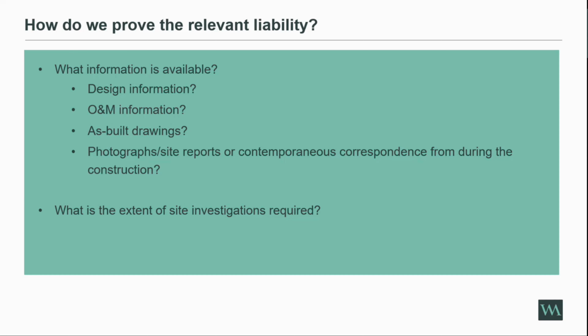It's fine for us from a legal perspective if, as you start to carry out investigations and take apart the external walls, a clear pattern starts to emerge, then that might be sufficient. We don't need to go any further. As I say, nobody wants anybody to come along and start taking off all of their external walls, and it's not cost effective to do so. And you end up with all sorts of problems of what do you put back. But obviously the difficulty is if there are no clear patterns, then we may need further investigations and further opening up works to try and establish what was actually there on the site.